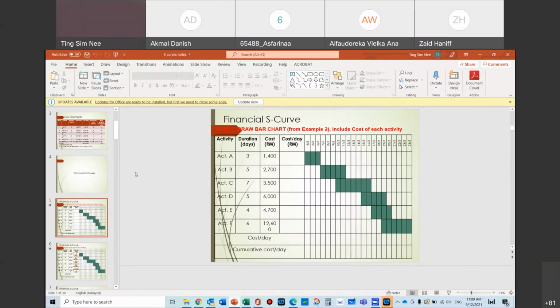Okay, you can see across the time how many bars, how many columns it picks up. So not necessarily you divide exactly by 3. What I can say is, I've said this before, let's say 1,400. You can actually have $400 in the beginning, 500 later. So you are actually spreading your cost over the Gantt chart.